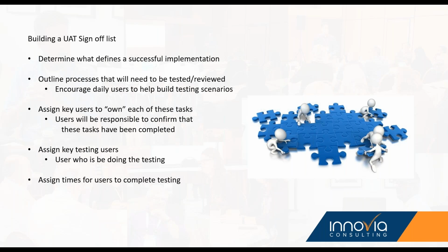And that is the piece that I find is most often missing when it comes to user acceptance testing. People get siloed and they're like, I just got to go in and test these processes and that's it. And they just put pass, fail, and there's no communication to the other team members. And that's a dangerous thing because every team member does it just a slightly bit different.